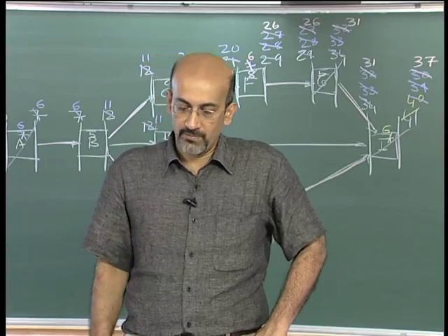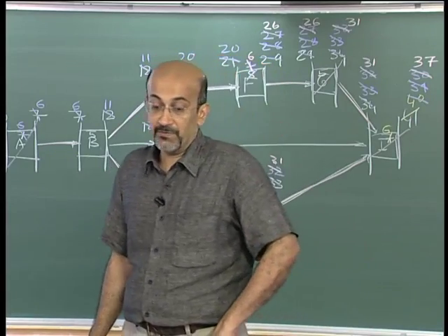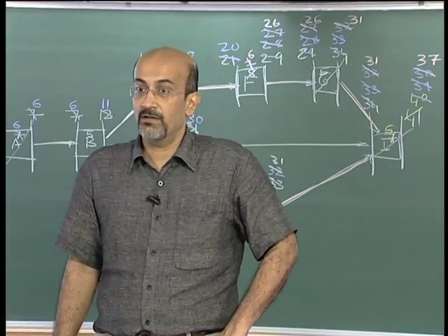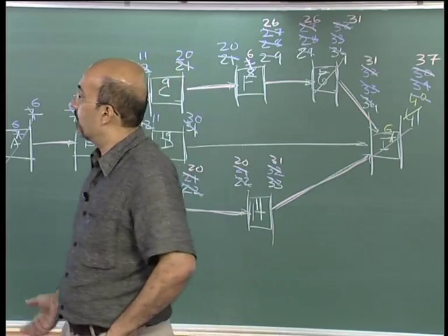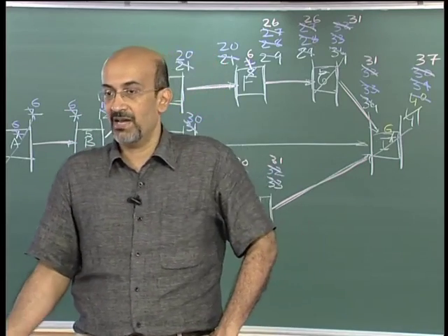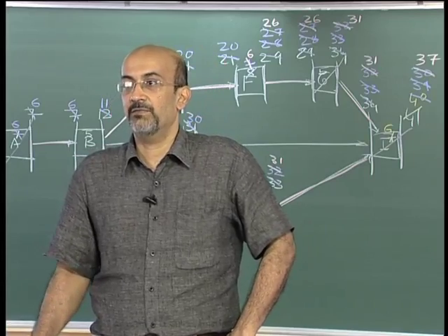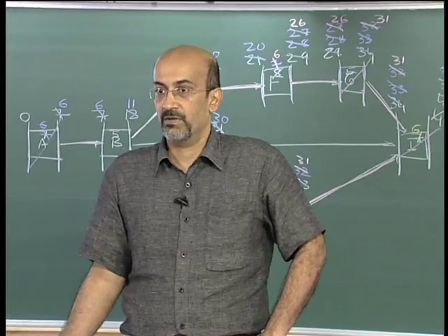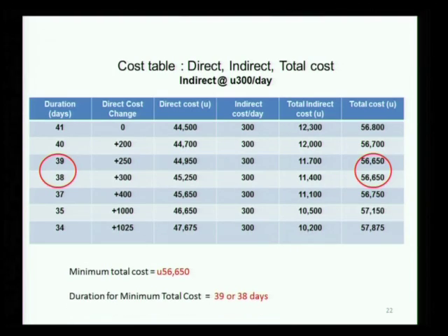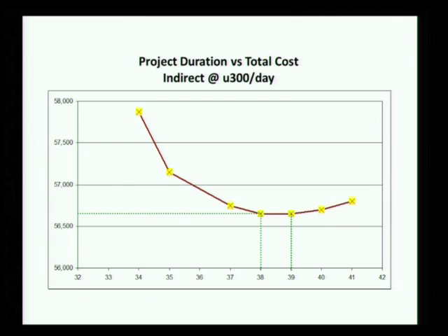Okay. Now what if the indirect cost was, say, something like 350? It would have a unique solution, between 300 and 400. Okay, because so long as I spent 300 and gained 350, I am gaining. If I spent 400 and gained 350, I am losing. Okay, so it would be on that value. Okay, so here we have the same values. Now we have seen this is shifted because it is 300.